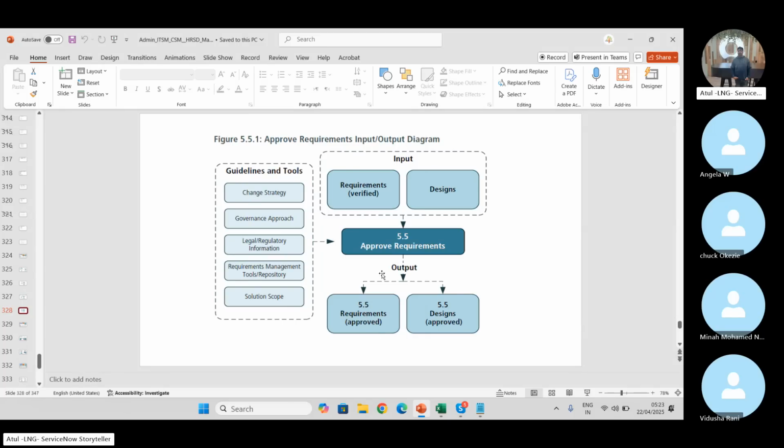Now, if someone says, I want to make a change in this, pause the complete process. It is not possible to add it. Create a story, create a requirement and add it to the backlog, and we will discuss. But adding to this one is not possible, unless it is compliance related and needs to be approved by higher management.